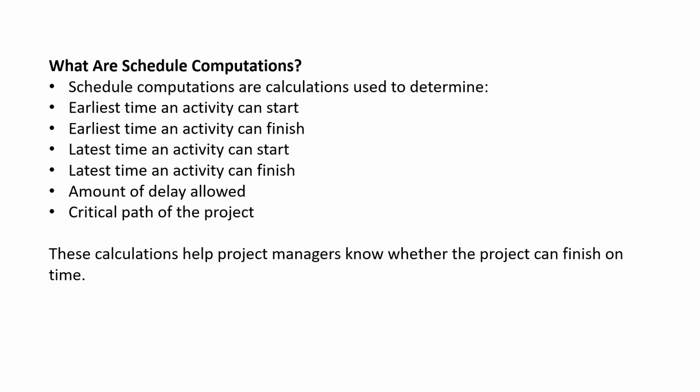Most importantly, this computation helps us identify the critical path of the project. The critical path shows the activities that must be completed on time because any delay will delay the whole project. In simple terms, schedule computations help the project manager know whether the project can finish on time.